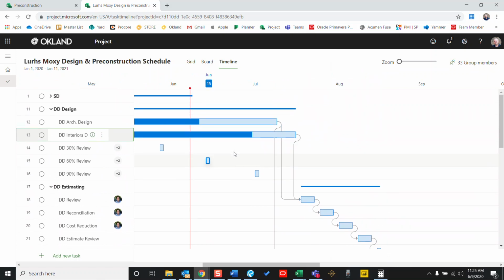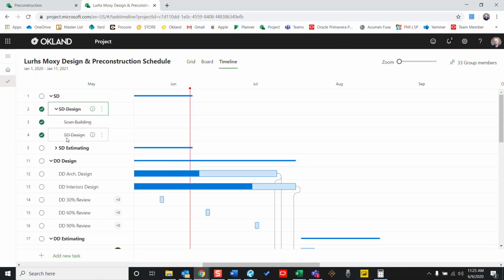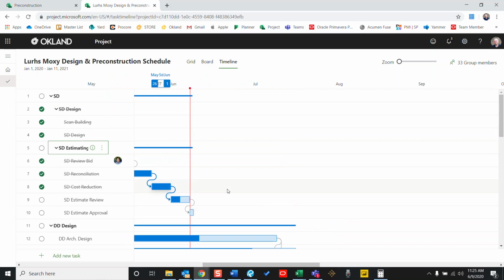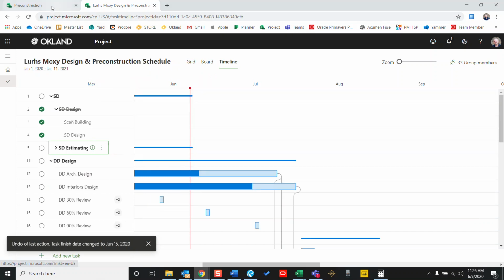Something really cool that I thought was awesome here is when you are behind schedule. Let me go here, and I just don't know, right? You see this, and you see the dark blue is what we've completed, light blue, but red is where we are now, and we should be starting this activity, but we can't because we have this right here. So we could recommit and push this out to here, and it live updates anything, and if this was linked to anything, you would see that, push that off, and so on and so forth. I'm going to undo that really quick.